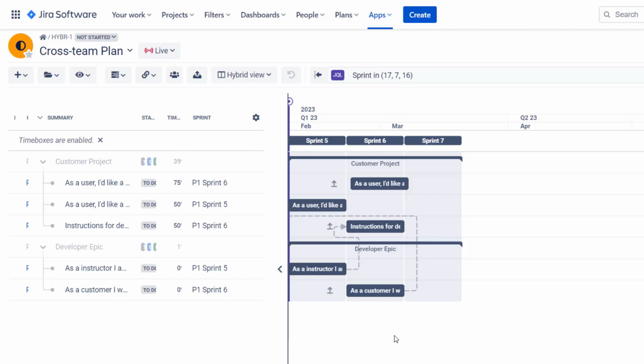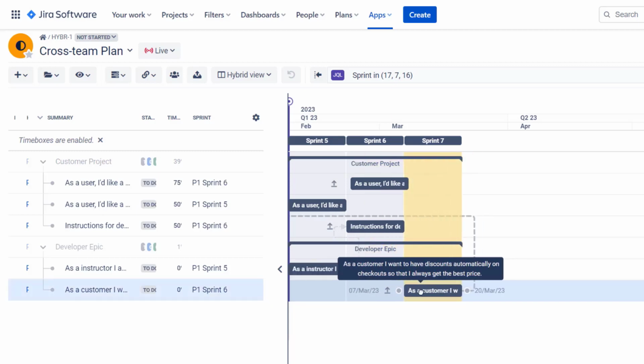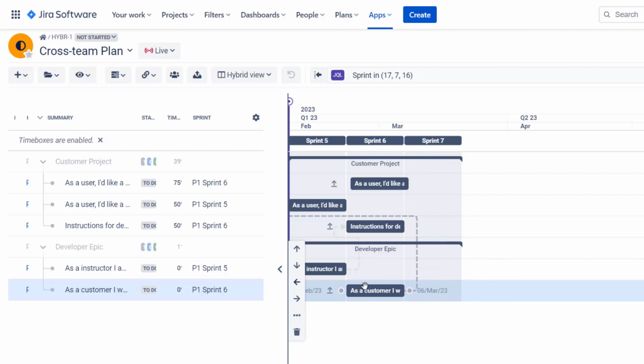And then in the Gantt chart, we will see the whole overview. So we will see tasks that are assigned to specific sprints, and what the dependencies are between them and the tasks that are planned in a waterfall approach. By moving a task in the waterfall approach, we will be notified that, hey, we should replan the task in some sprint, or moving from one sprint to the other with some waterfall task being dependent will cause this waterfall task to be moved. So this is something that Advanced Roadmaps does not cover.